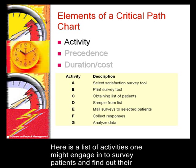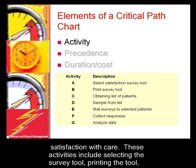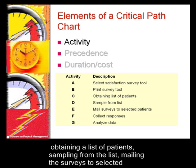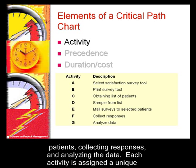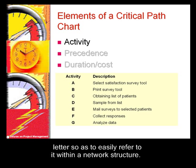Here is a list of activities one might engage in to survey patients and find out their satisfaction with care. These activities include selecting the survey tools, printing the tool, obtaining lists of patients, sampling from the list, mailing the surveys to selected patients, collecting responses, and analyzing the data. Each activity is assigned a unique letter so as to easily refer to it within the network structure.